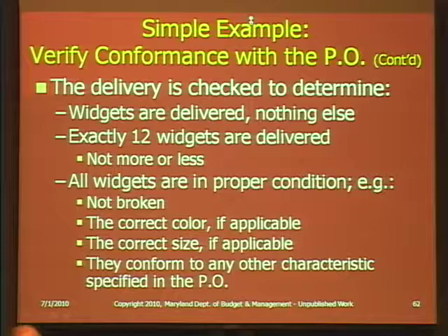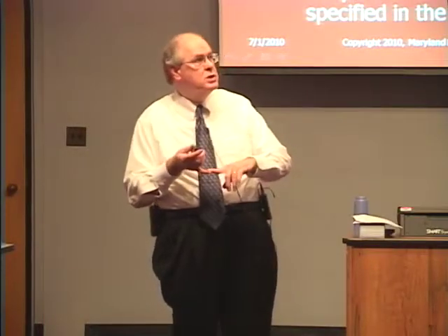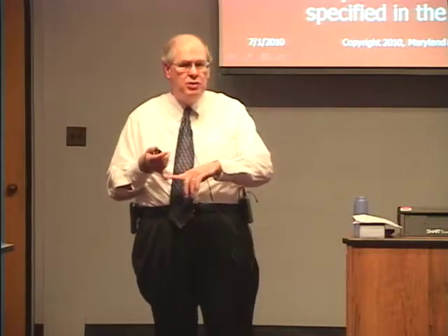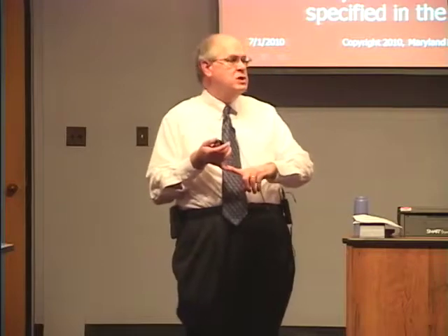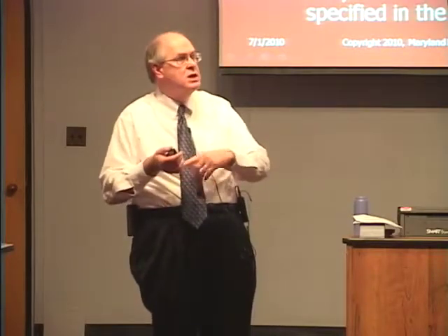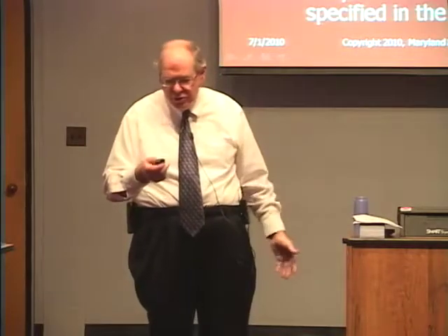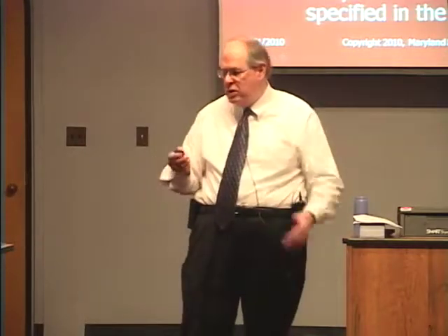And assuming that it's not something that is hidden, that you can't open, then open the package, verify that yes, they're widgets, and they're widgets that comply with the qualitative standards. Qualitative standards meaning they're not broken. If we specified a color, they are that color. If we specified a size, they are that size. And anything else we specify, they conform to it. So that is what the receiving clerk is going to do in the role of the contract manager.